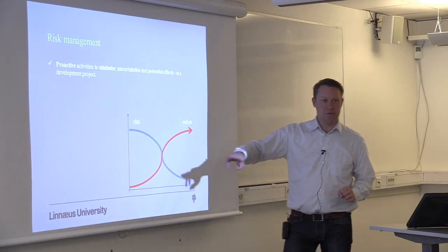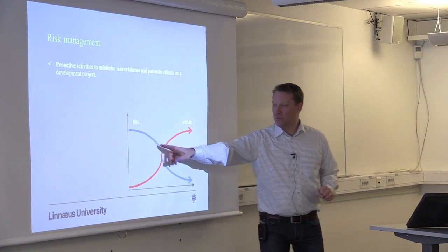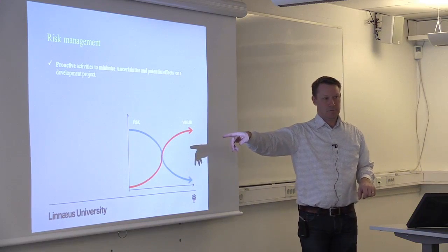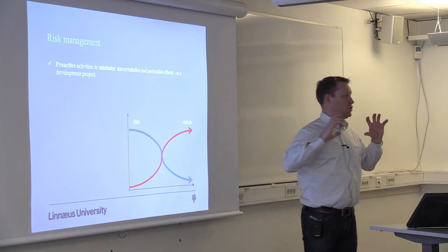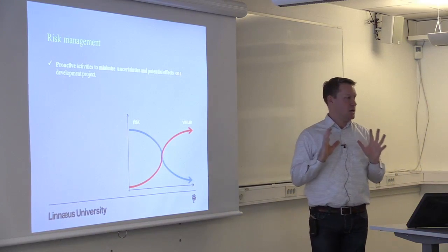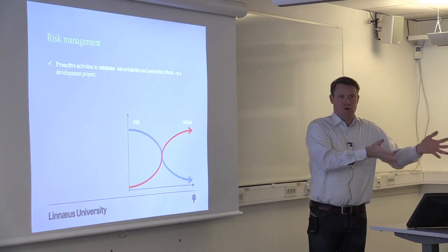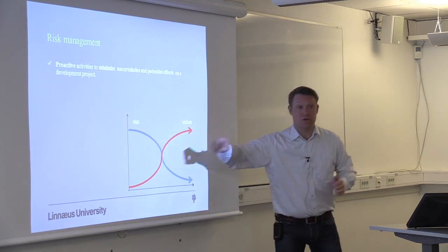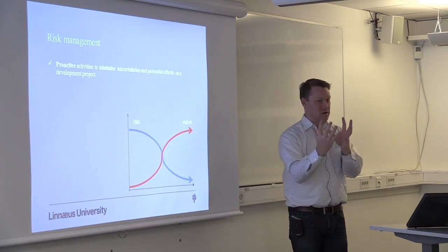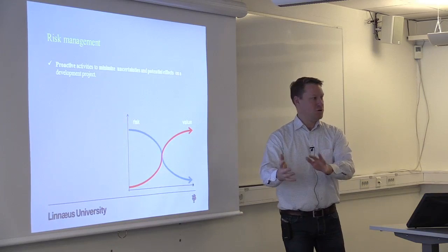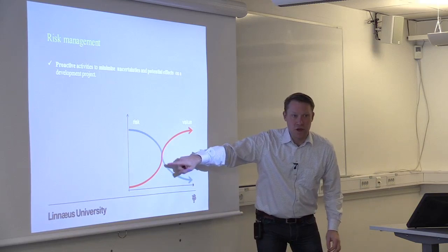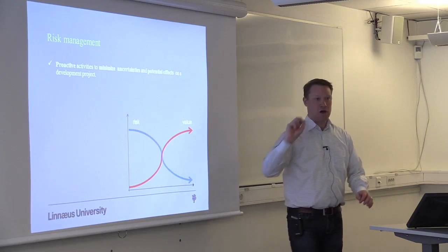So early in the project, you focus on risk to remove risks from your project. Having the big picture, having the system architecture of the system set and accepted by the customer early in the project, that is reducing the risk dramatically. You know that you're at least in the right country in terms of your solution. And when you have reduced the risk, then you can start to add value.